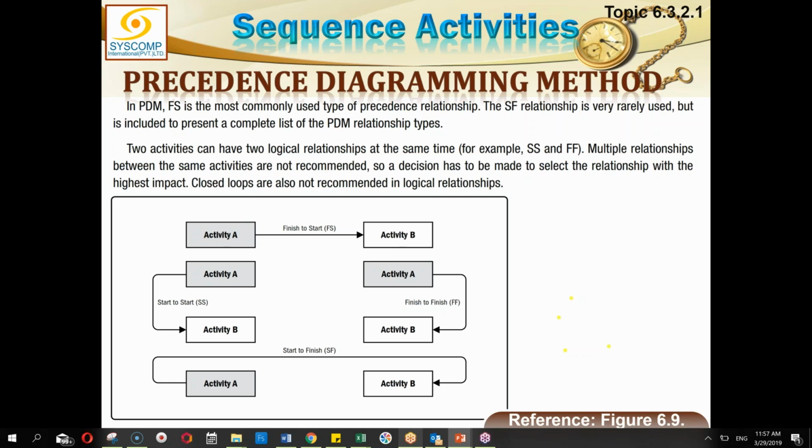I mean, practically it would depend upon the activity itself, and up to how much extent it is possible. Forget about the practicality. Just tell me, theoretically, if somehow I can do some overlap, the things can be done earlier. Yes. By increasing parallelism, I can fast track the project and I can reduce the time. Theoretically, we understand that. Why are you saying that this is impossible?